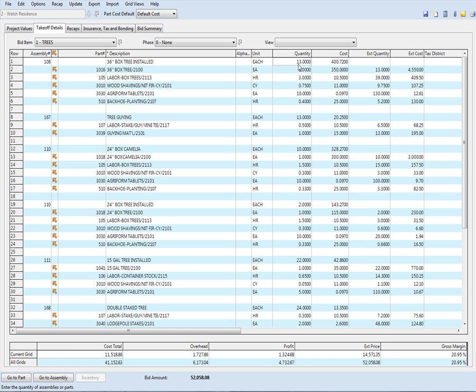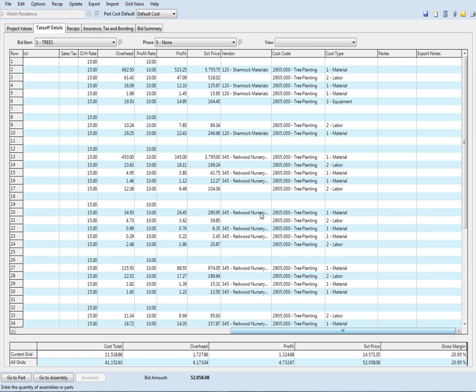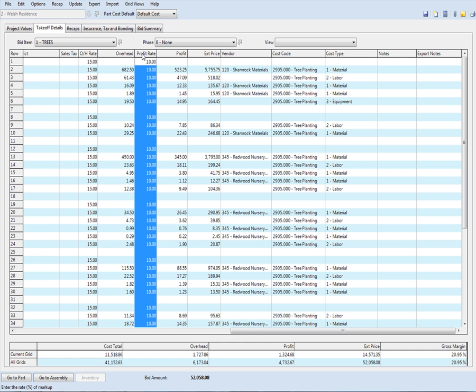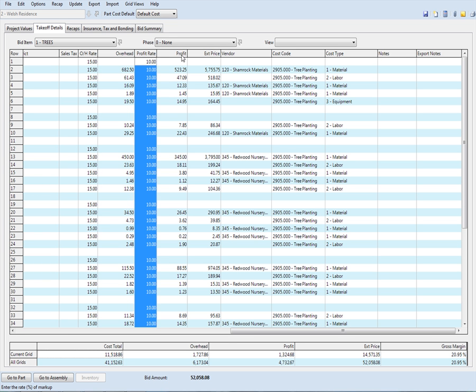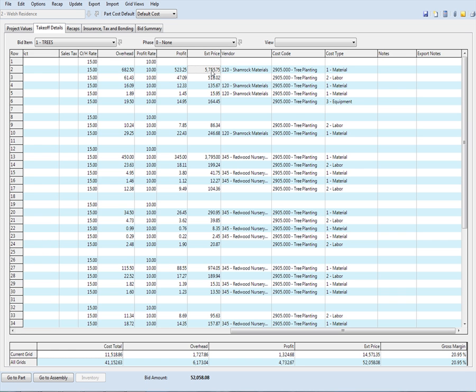It doesn't make any difference if this job has 13 and the next job has three - you just change this quantity and it extends out these quantities correctly. Then you can put your overhead and profit rates on it. This is the profit you have on it. This is the extended price with the cost and the profit. This is who I'm going to buy it from, and this is the item. We call them cost codes. You call them items in QuickBooks.